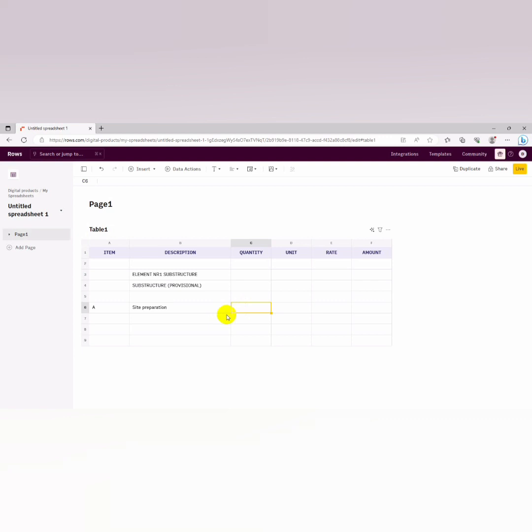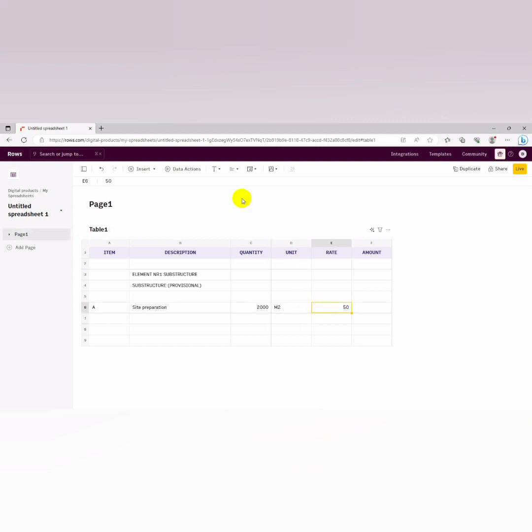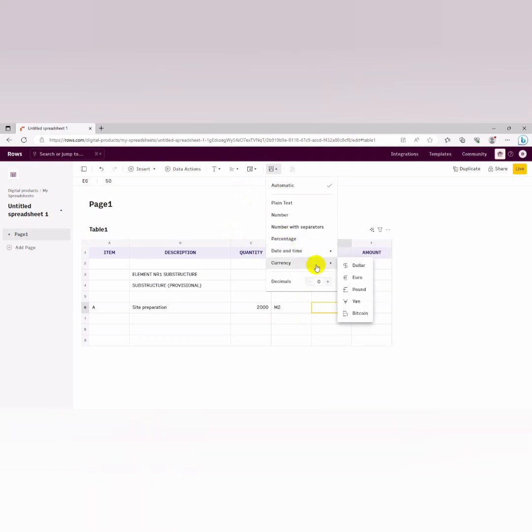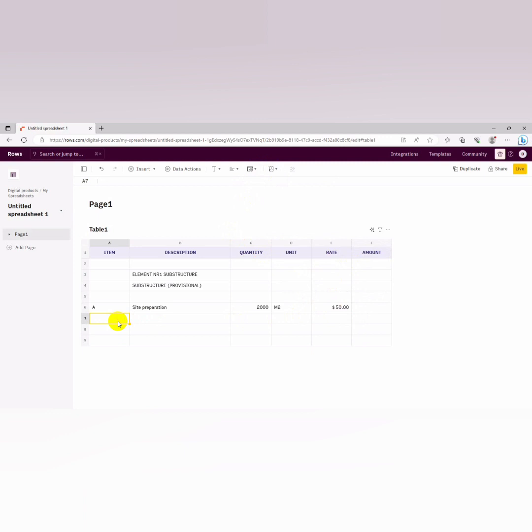Let's just input assuming we took the quantity, the area of the site that we're going to clear is about 2000 meter square. We can just put in our units. And then assuming the rate is $50, we can just put in the $50 and then we insert the currency. Let's also assume that we did our topsoil element, item B, and then we have our topsoil excavation.